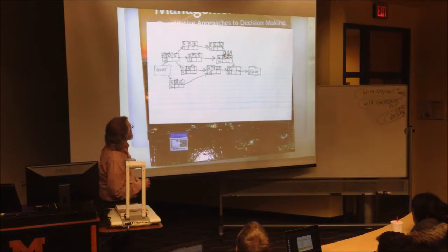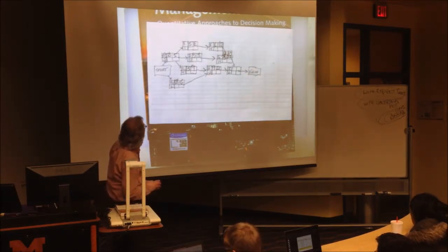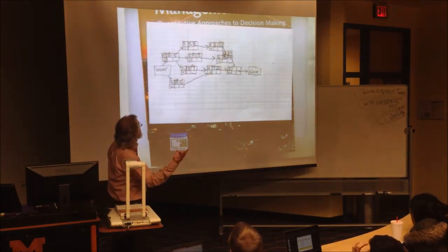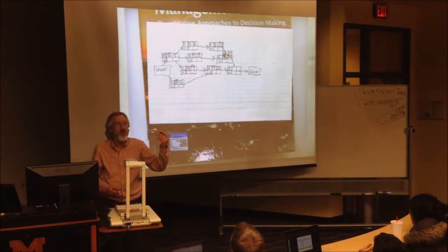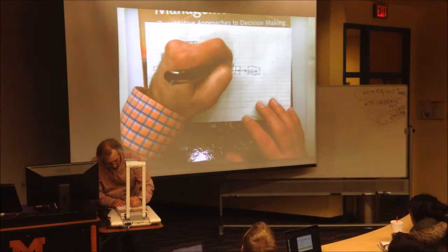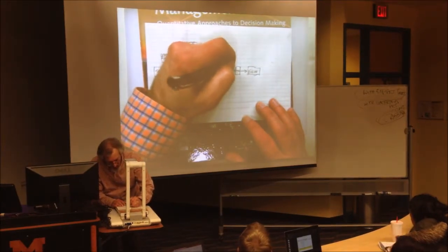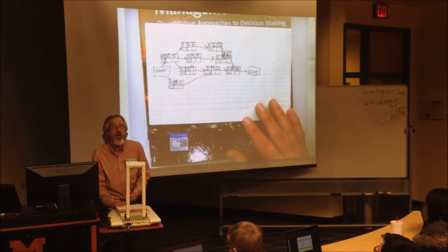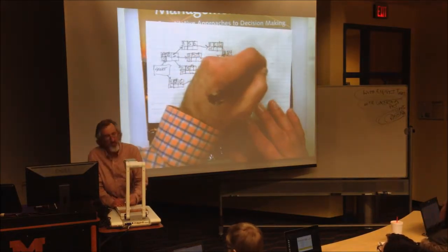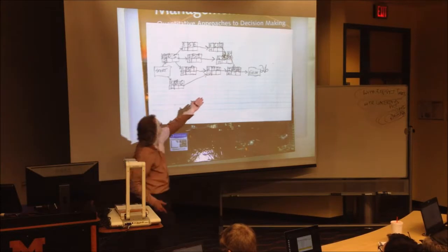Where are we at? I. I is preceded by 2 activities. H ends at 21. G ends at 24. I starts at 24. It's that easy. Add 2. This project is expected to take how long? 26, because we're at the end.